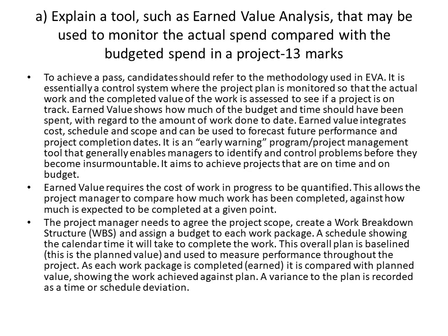So candidates should refer to the methodology. It's essentially a control system where the project is monitored, so the actual work and the completed value is assessed to see if it's on track. And earned value shows how much of the budget and time should have been spent with regards to the work done to date. Earned value integrates cost, schedule and scope and can be used to forecast future performance by calculating the CPI and the SPI and completion dates.